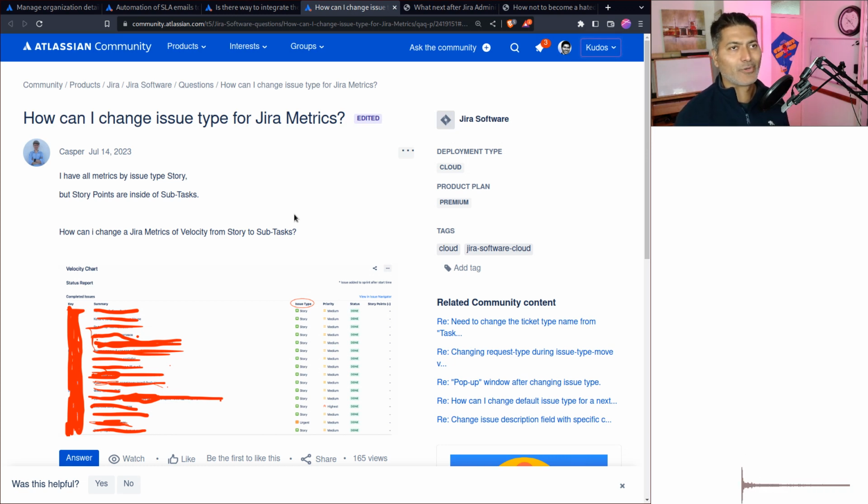I think Agile is, of course, a bit complicated topic, but at the same time, if you're using a tool like Jira, because Jira is flexible, people have some expectations. So I think, and again, this is something that I do almost on a daily basis, I tell my clients, okay, if you want to use subtasks, fine, but we'll probably have to use EasyBI to look at those story points on the subtask, or maybe we need to automate it, because using automation, you can always roll up.